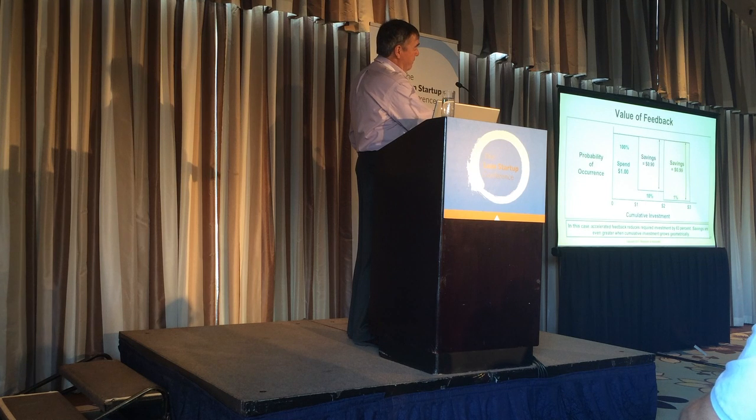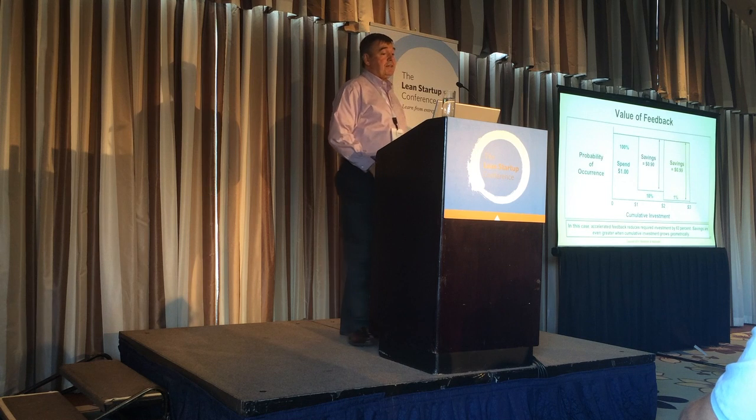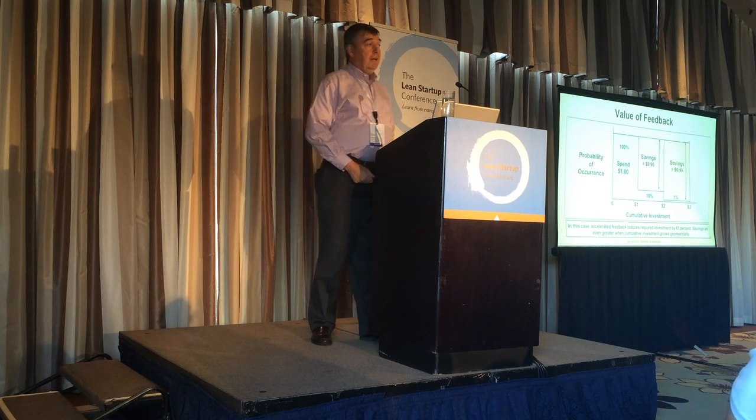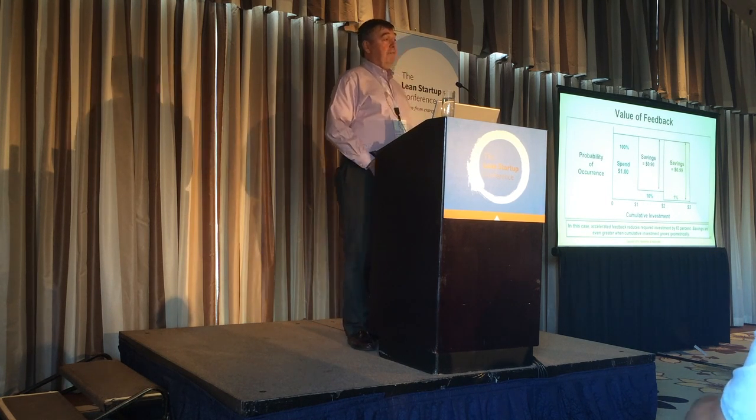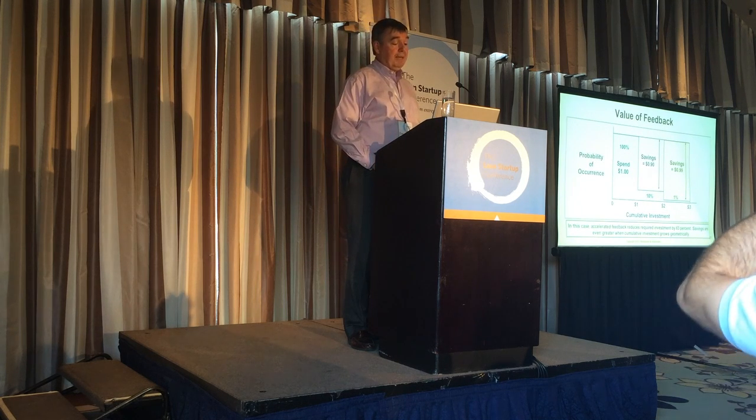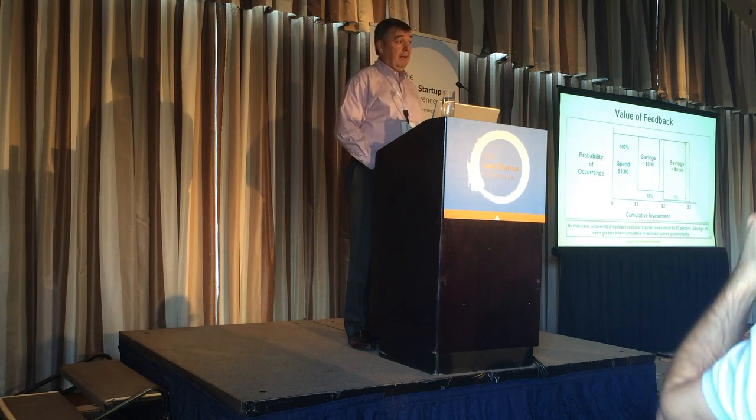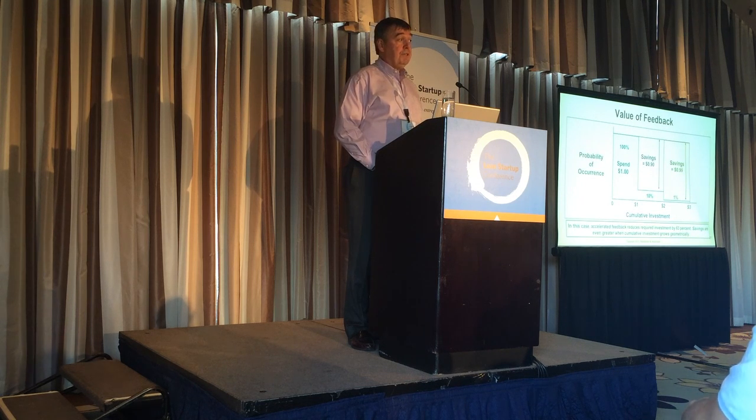There's a 100% chance I'm going to buy the first digit, a 10% chance I'm going to buy the second one, and a 1% chance I'm going to end up buying the third digit. I've changed this from a break-even game to a game that pays off $1.89. I didn't change the payoff, it's still $3,000. I didn't change the cost of the investment, it's still $3 to buy 3 digits. I've given you the option of shutting down the game at intermediate times in the process. That creates enormous economic value.